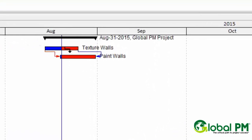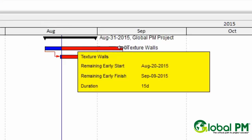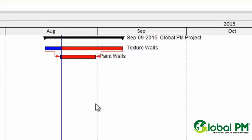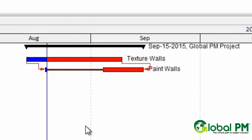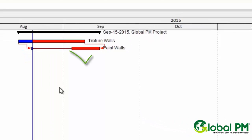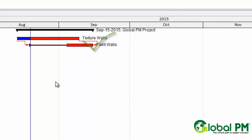To illustrate this, what I'm going to do is drag the duration out on texture walls and then reschedule, and you'll notice that paint walls pushes out to the right. Thanks for watching.